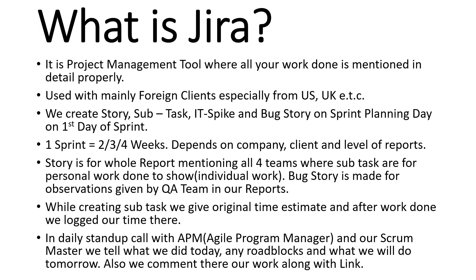Under the story, all teams — Power BI, business analysis, database, and QA — everyone's work and the original time required is mentioned. For example, for a basic Power BI report, you will mention you need two to three days. The BA team will say they need two days for analysis. The QA team will say they need three days to verify numbers and check the report. The database team will say they need two days to create the view or stored procedure.